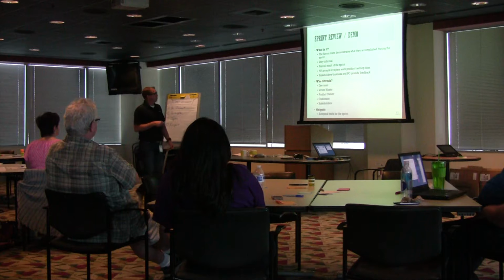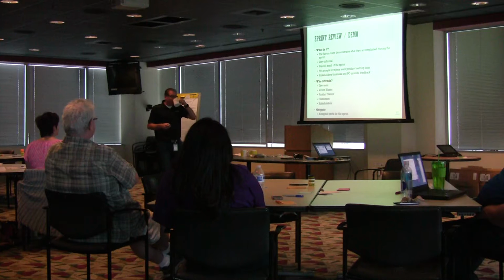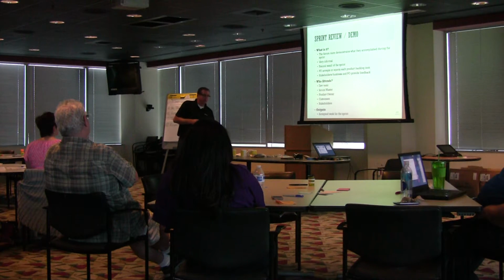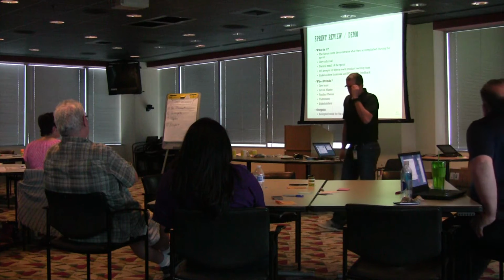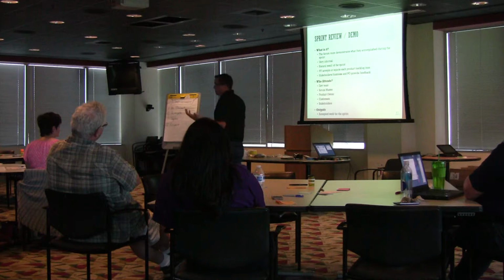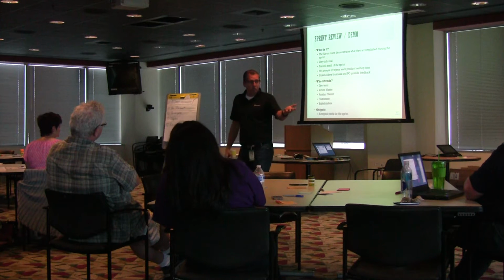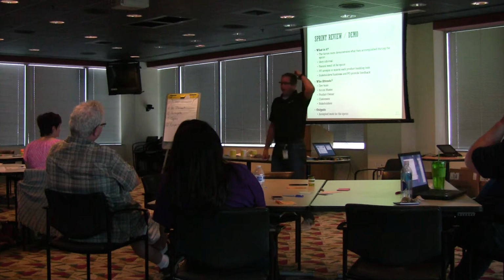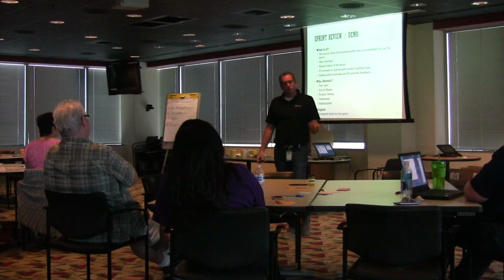Question, but if the PO accepts or rejects each item, but the PO is the voice of the stakeholders, why are the stakeholders there? To provide the feedback that we're on the right track or not. So let's take the scenario. It's a great question because I've encountered this a number of times with different teams. I have a great written story with awesome acceptance criteria. The dev team says, I know exactly what you want, and here's how we're going to do it. We come to the end of the sprint, deliver exactly what was asked for, and the stakeholder goes, huh, not exactly what we wanted. I see how you got there, but it doesn't feel right. Right? We've heard that. That's okay.